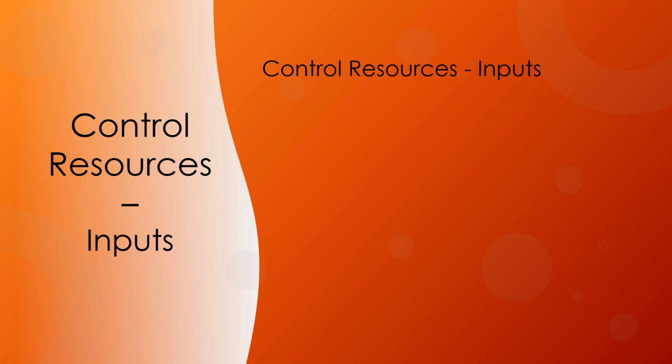The resources needed for the project should be assigned and released at the right time, right place, and right amount for the project to continue without delays. The control resources process is concerned with physical resources such as equipment, materials, facilities, and infrastructure. Team members are addressed in the manage team process. The control resources techniques discussed here are those used most frequently on projects. There are many others that may be useful on certain projects or in some application areas.